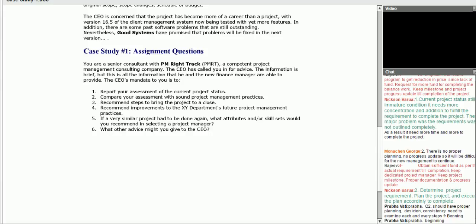Once the amount is approved by the steering committee, get the POC done from the vendor. POC is the proof of concept. Once you get the POC done, they'll share the prices or cost with you, and according to that cost, draw your project charter plan and move ahead. And accordingly, you also have to decide your milestones. You can call it a milestone, or you can call it a work breakdown structure.